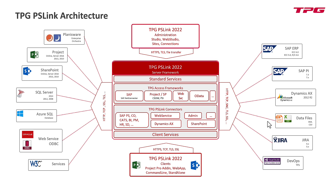At the end of the day, data needs to be read from Planisware, managed and possibly changed, then sent into SAP to create a new project there. How does PS Link know what needs to be done? This is defined in so-called integration jobs — human-readable scripts that our consultants build together with customers. This defines exactly: connect to Planisware Enterprise, get this project with this project number, read the corresponding WBS elements that have a checkmark, add or filter data as needed, and then transfer it into SAP to create a new project with WBS elements.